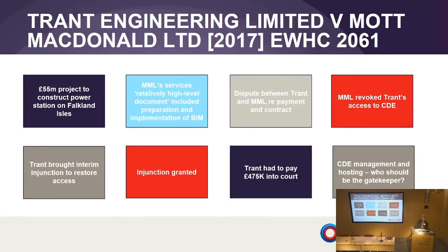Trant took Mott on in the initial stages to do some small design elements with a view that if Trant won the tender, they would take Mott on fully. That happened. Two parties were working together, negotiating a contract as they went along, which never got fully completed, was never fully agreed. And as tends to happen, parties fell into dispute about payment, contract terms, who was doing what. And so the dispute rumbled on.